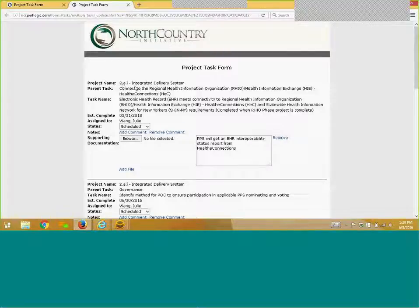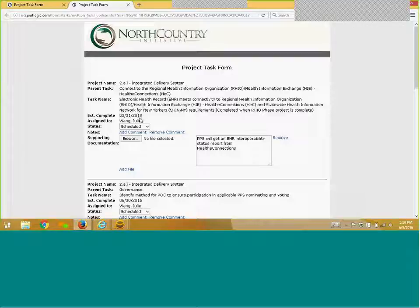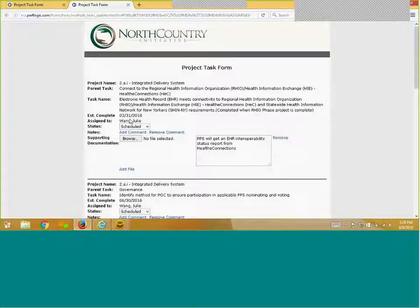Project name: the name of the overall project for which you have agreed to participate. Parent task: the umbrella task under which your specific assigned task is housed. Task name: the specific task for which you are responsible. Estimate complete: the completion date you have committed to. Finally, assigned to: the individual within your team assigned to execute this task.